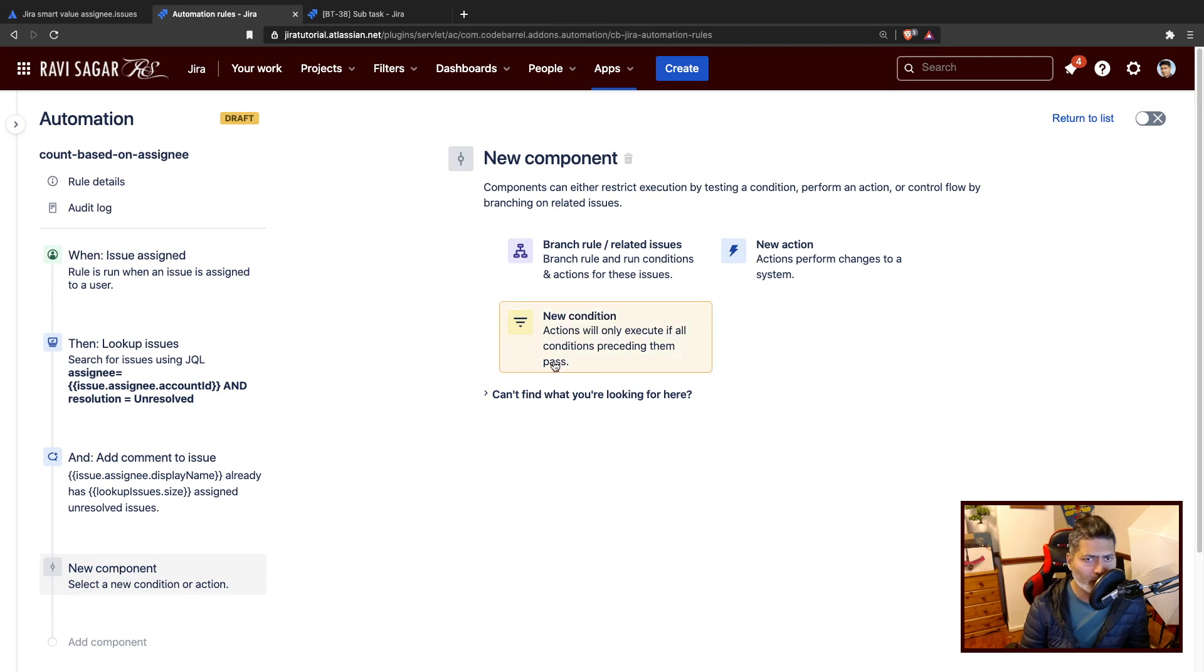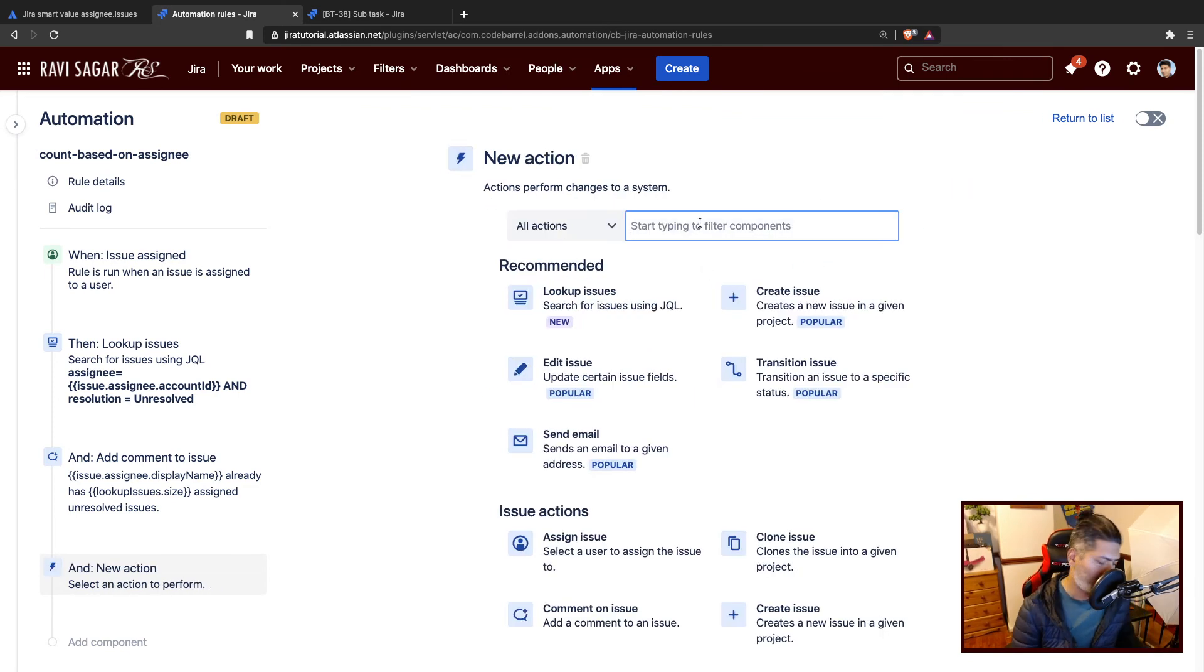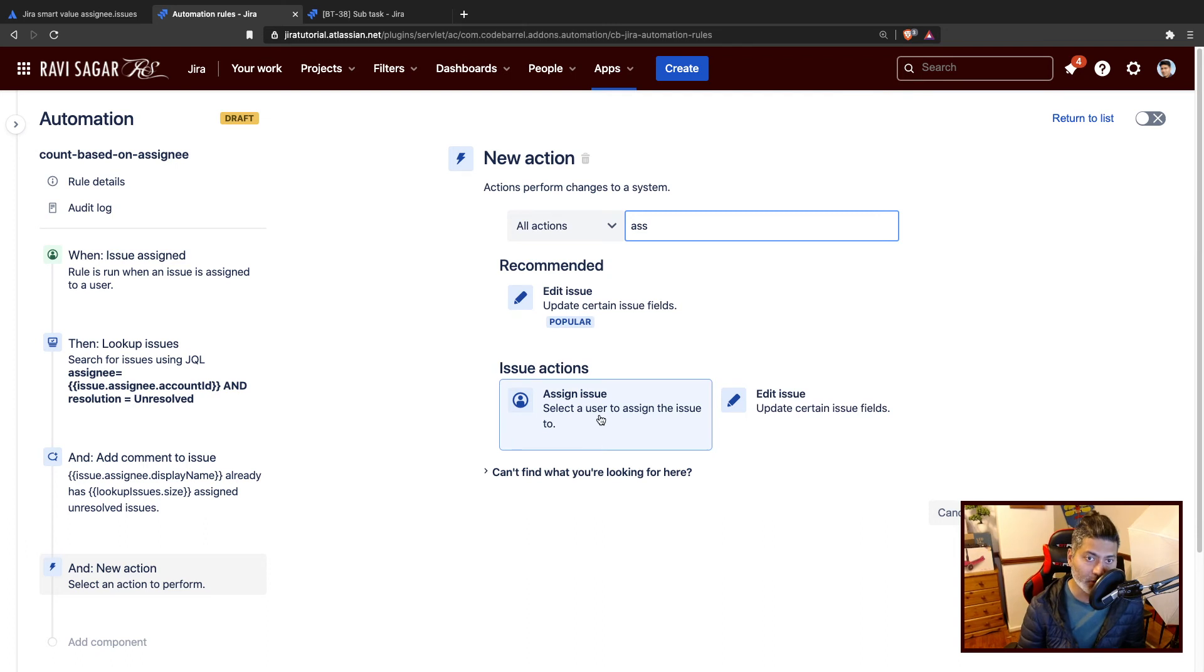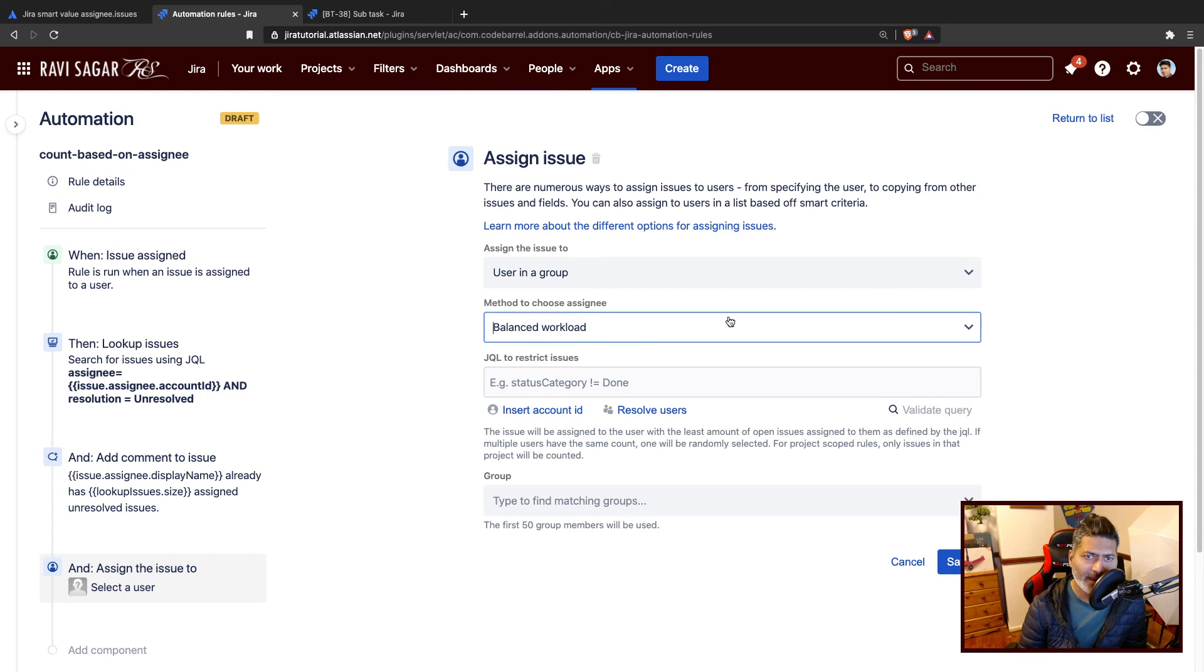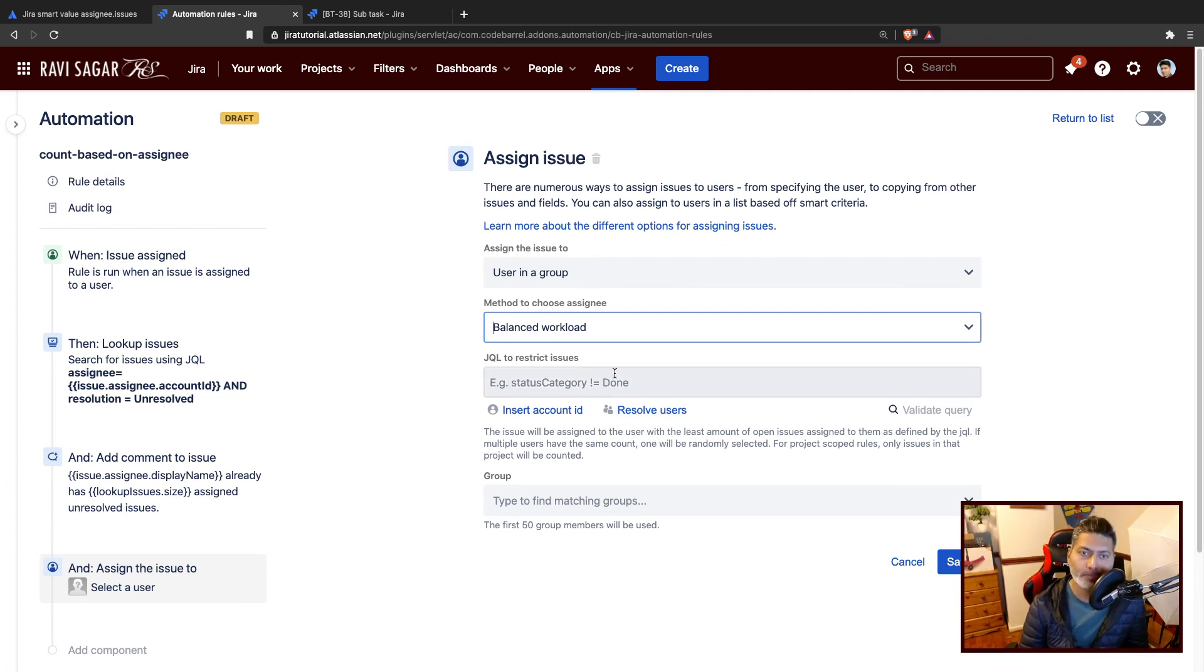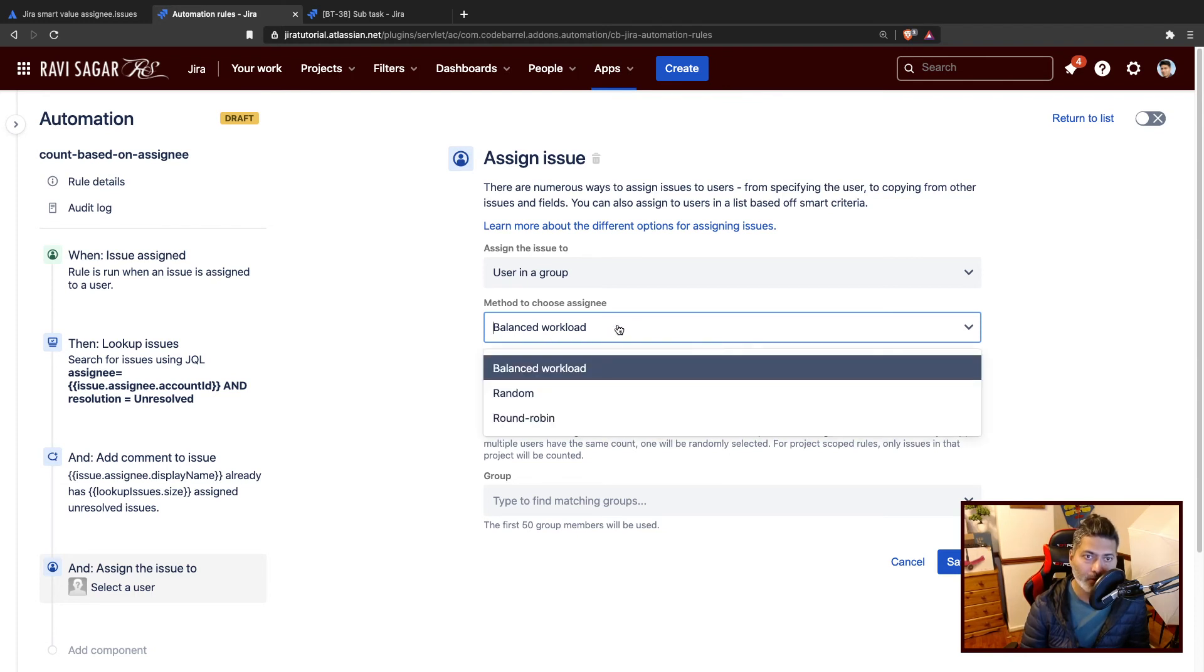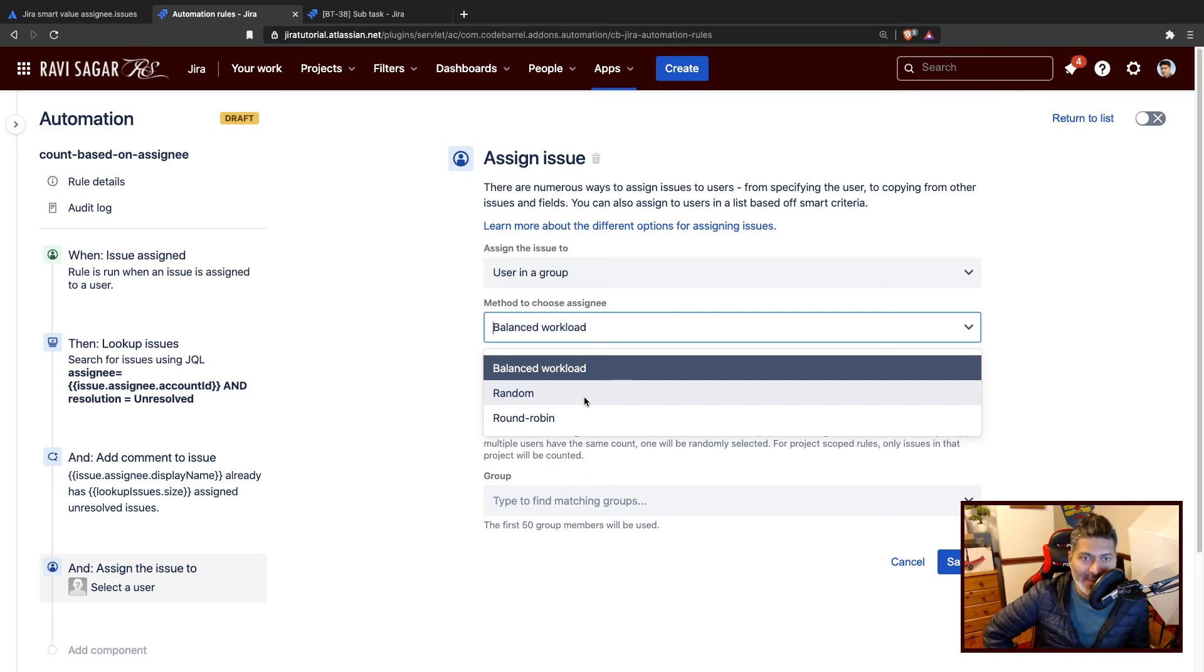There is also one more thing that you can do using assignment. If you take a look at a new action, there should be something called assign issue. If you click on assign issue, you can then select a user in a group. Using automation, you can also do assignment automatically. If you want to assign the issue to maybe users in a group based on maybe balanced workload, you have three ways to do the assignment. If you select balance workload, I believe automation will make sure that everyone in that group has roughly equal number of issues assigned.